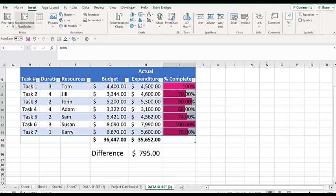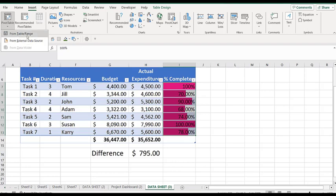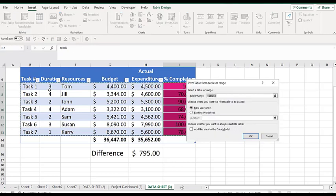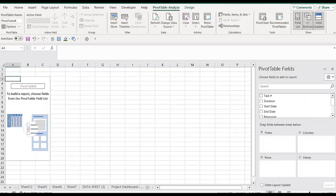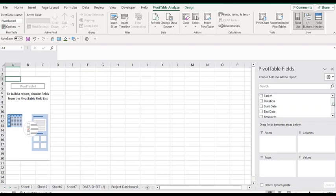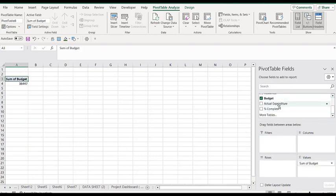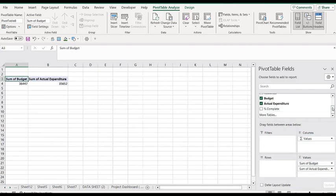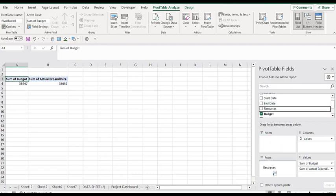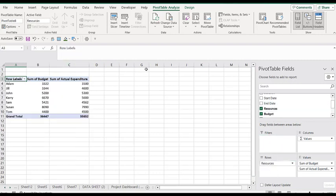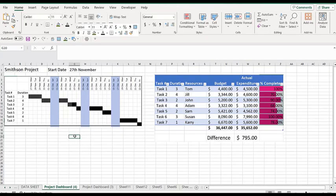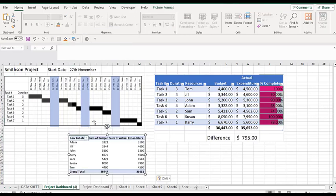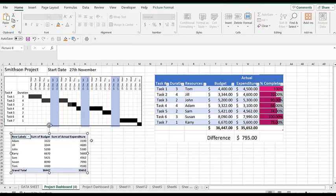I'm going to go into insert pivot table. They have automatically chosen the range because this is already formatted as a table. I want it in a new worksheet. What I want in this one: I want the budget in values, the actual expenditure in values, and the resources in the rows. I already now have another table. This is going into my project dashboard.